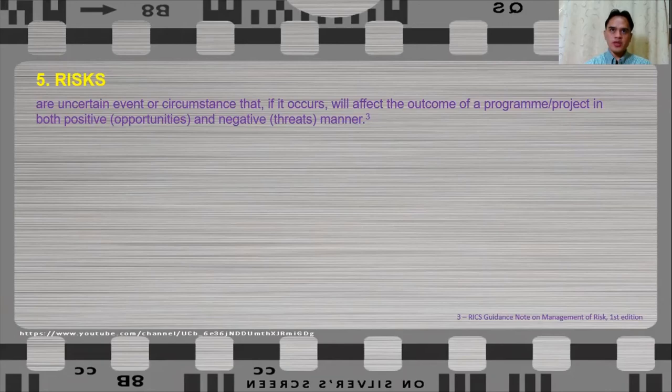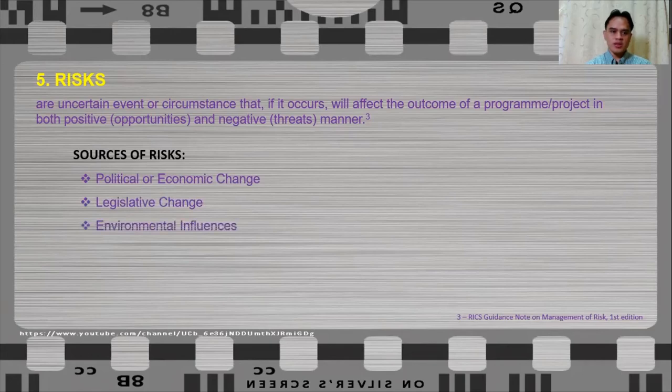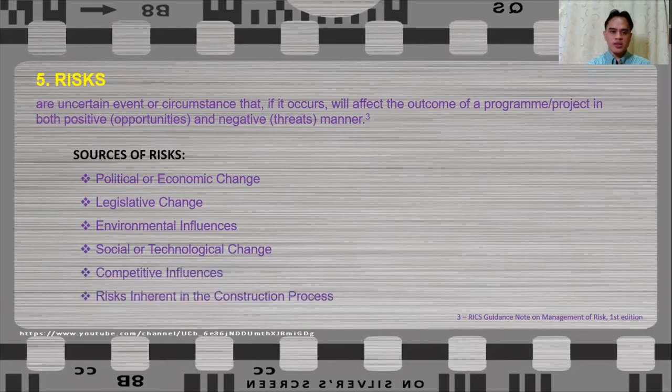And risk may appear in a number of different ways and it may occur at any point of the life of the project and many of which are outside the control of the client. Risks can come from the following sources: political or economic change, legislative change, environmental influences, social or technological change, competitive influences, and risks inherent in construction process.